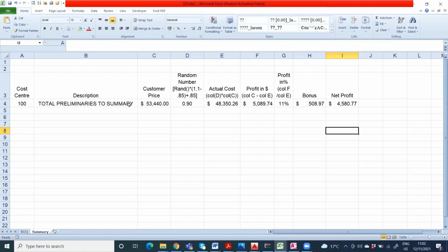But at the beginning, what we know is the specific scope and the agreed value for that work in our agreement. That is the BOQ price. But still, we can use Excel or a spreadsheet to forecast the progress of a project. To do that, we can create a special factor called a random number to account for the actual cost, right?